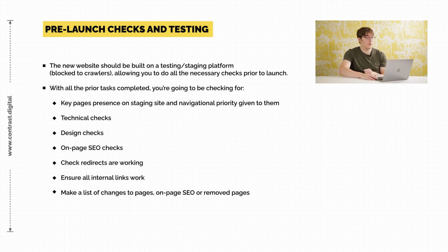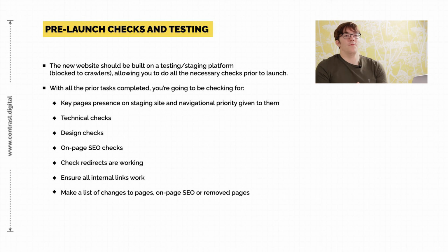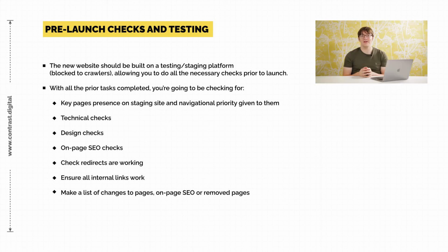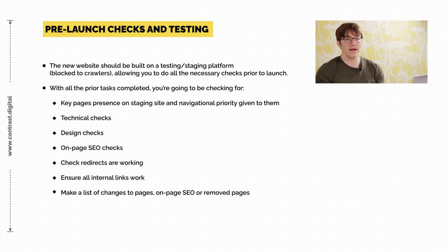So it's worth it. Something else from experience that is worth doing in this process is running a document as a change log of all the things that we've done through this migration. For argument's sake, in the redesign we've changed the homepage, these are the elements that we've taken out and these ones that we've added in.